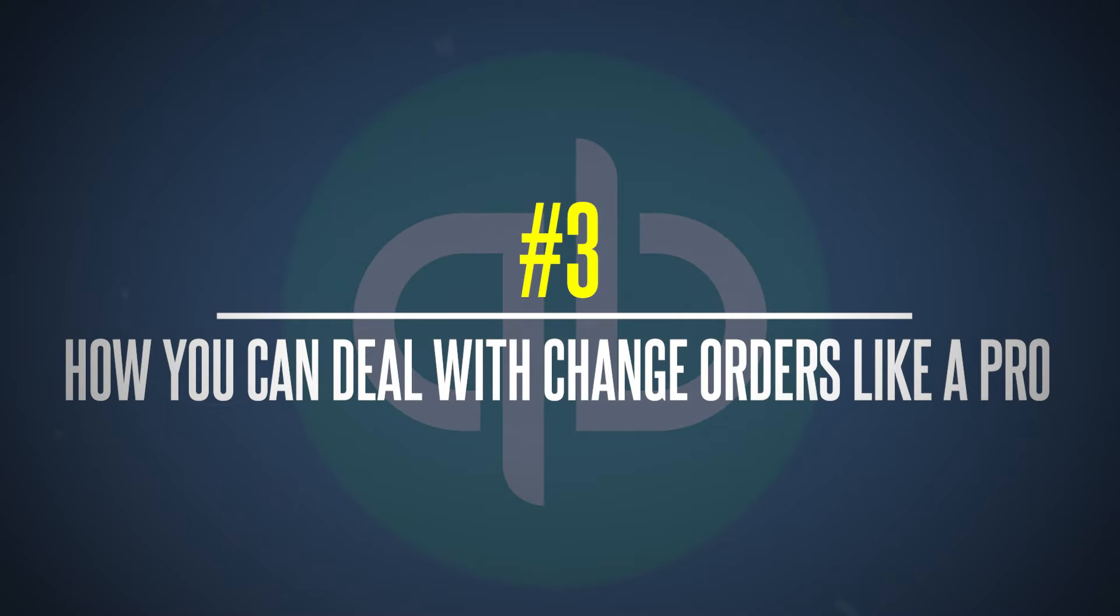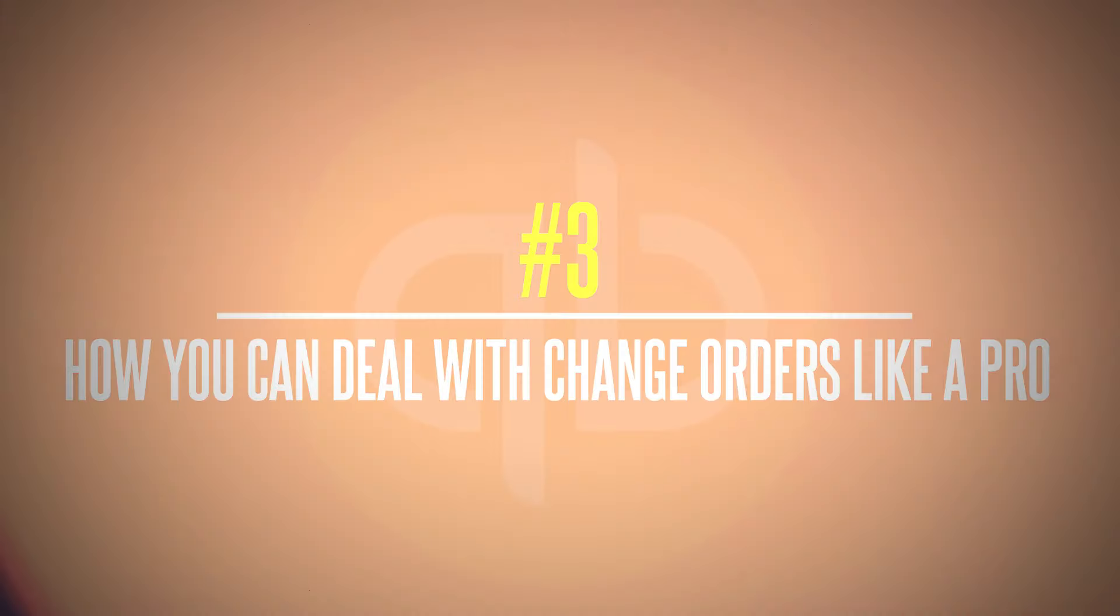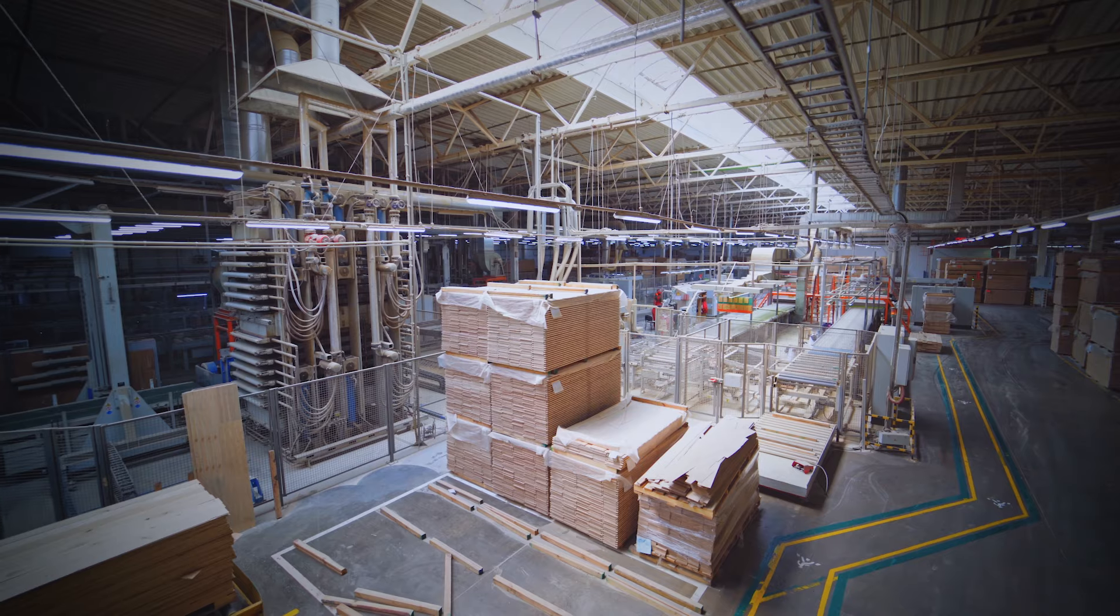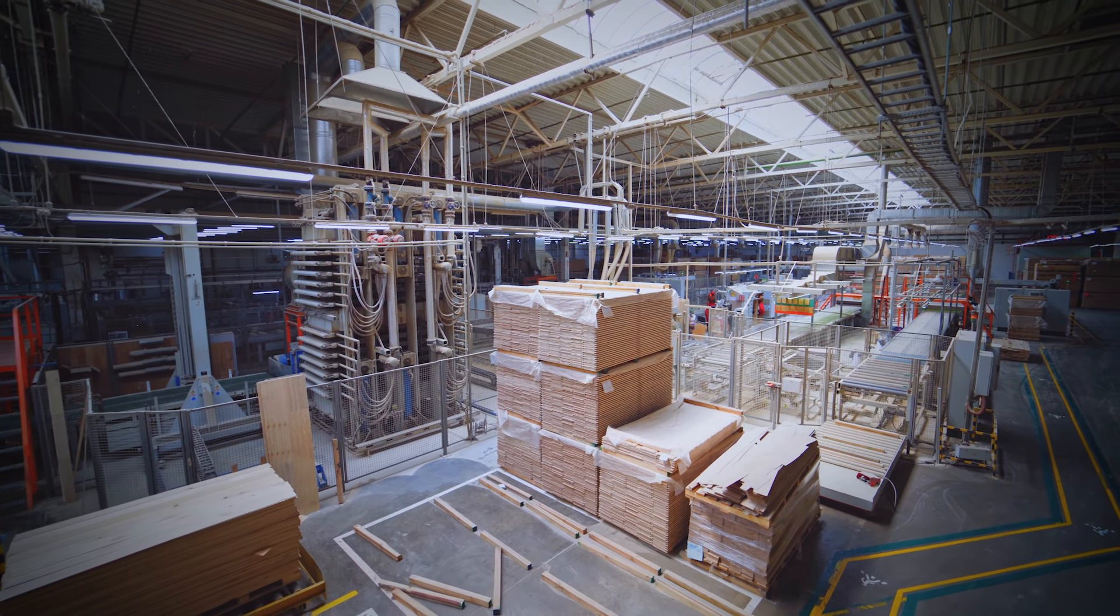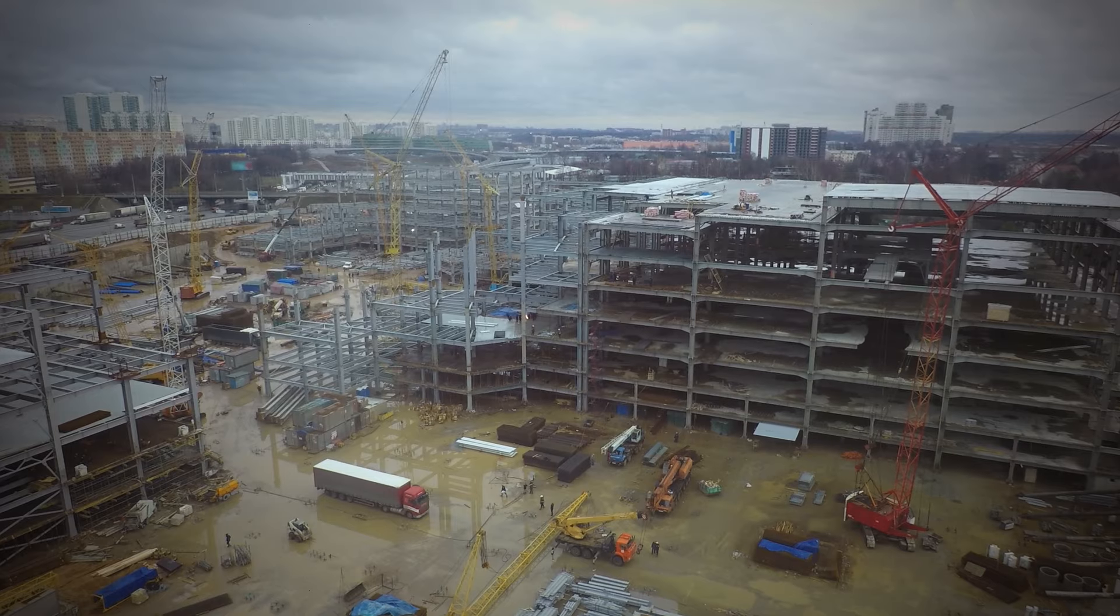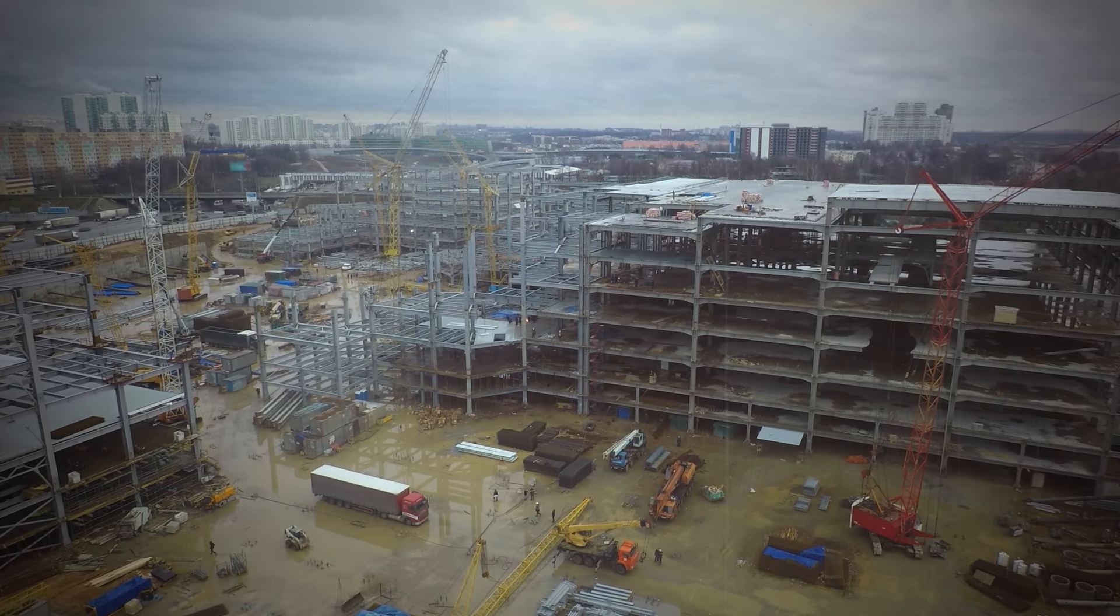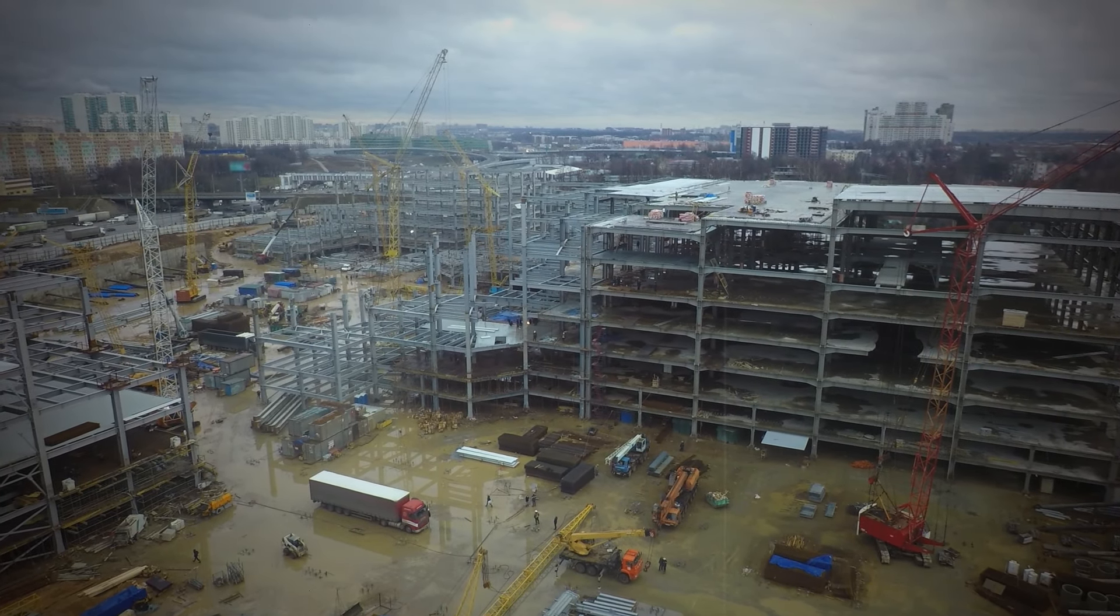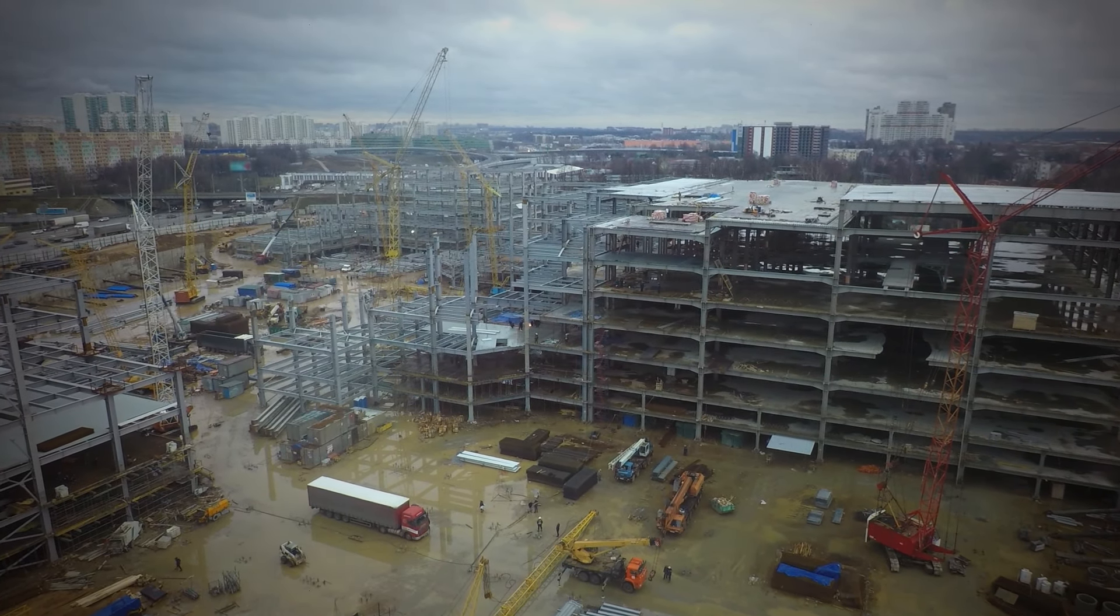Lastly, here is how you can deal with change orders like a pro. If you've ever been in construction for more than five minutes, you know change orders happen—it's normal. Whether the client wants to change the scope of work or something unexpected pops up, like there's a sudden shortage in materials or weather affects your area and causes complications and damages to the construction, you need to adjust that original estimate to reflect the new costs.